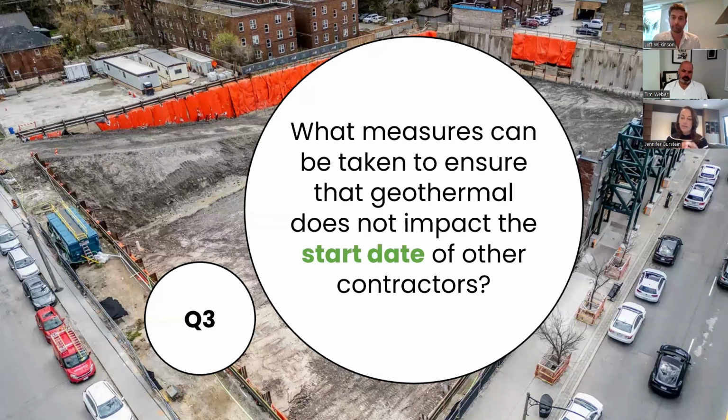If you're on a very small stamp site, let's say a typical site downtown Toronto, you may be in a position where you're dedicating your first 3 months of early works to geothermal drilling alone before your next contractor can start their activities.